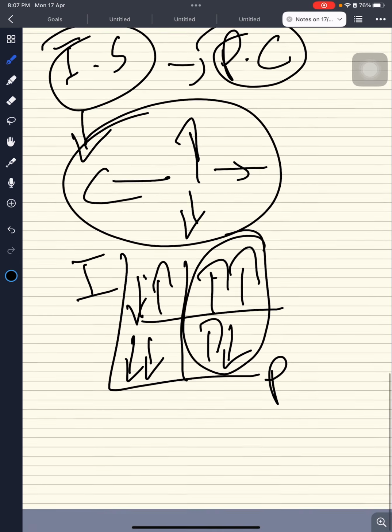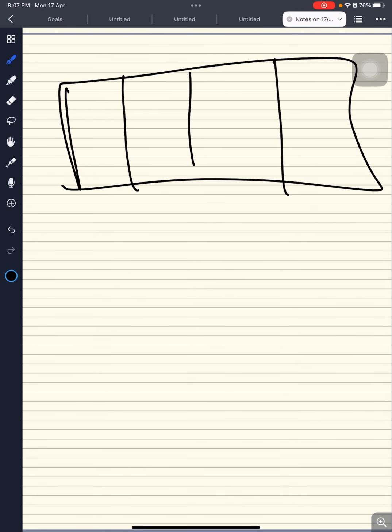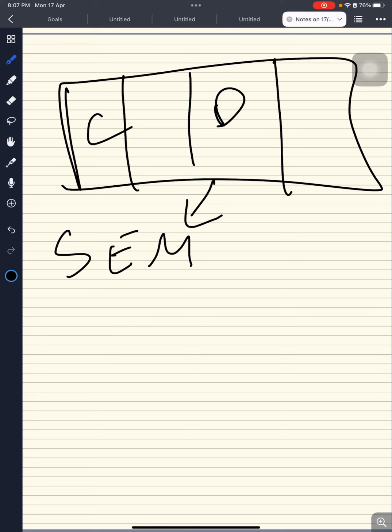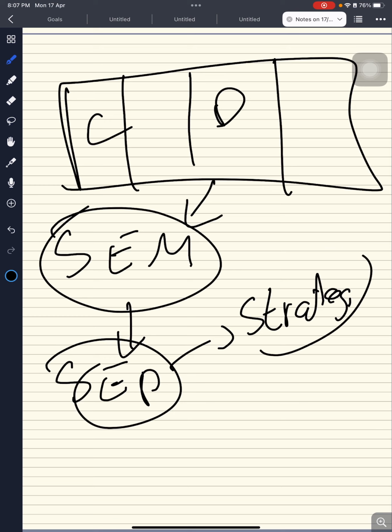So for these stakeholders, we put them into the stakeholder engagement matrix, where we check the current engagement of the stakeholder and the desired. And then we make the stakeholder engagement plan for the strategies that are required to engage the stakeholders.